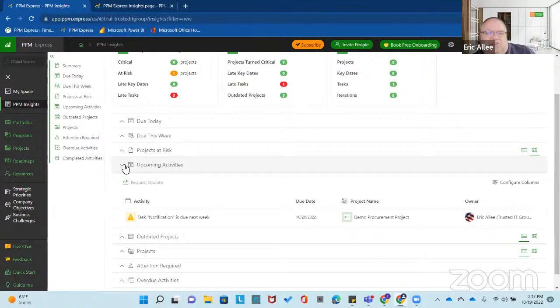So I adopted a strategy that said I'll look at projects at the 1 week mark, at the 3 week mark, and at the 6 week mark. And then I'll report on it, right? So I'm reporting to my client on their status at those points for each project. So I would align them to do that, right?